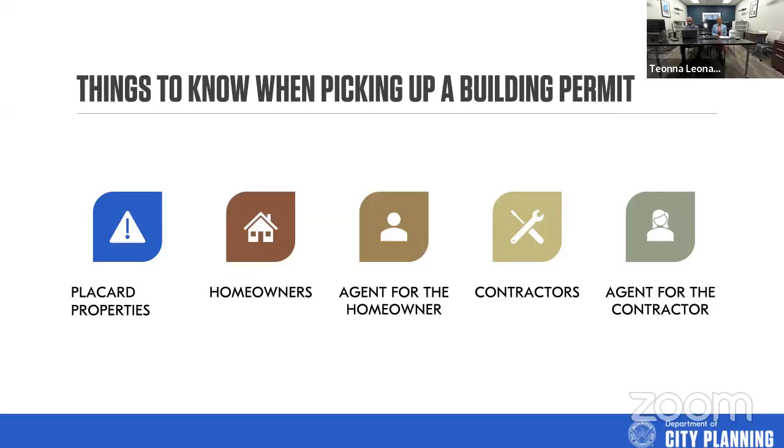I've seen people get all the way to the point of issuance and not realize that this letter is required, and it takes some time to get in contact with the staff over there in order to get that letter. So it's very, very important to start this at the beginning of the process versus waiting until the end.